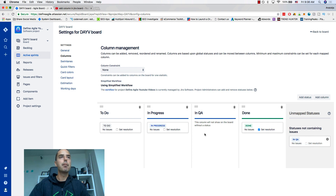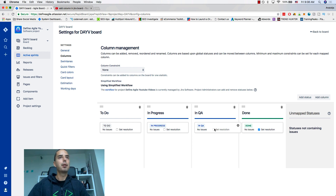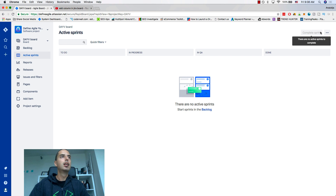Here's my new status, but it's not mapped to anything yet. To map it, I just place it here. Status is something you'll see inside a ticket — it will say it is In QA. Every column needs to be mapped to a certain status to work. Now if I go back to my board, I'll see To Do, In Progress, In QA, and Done.